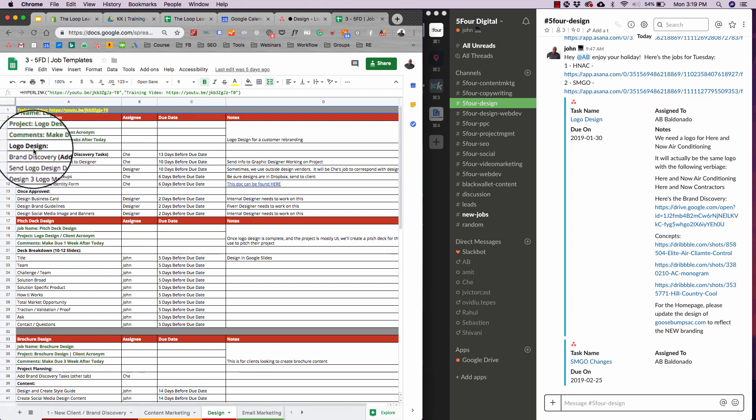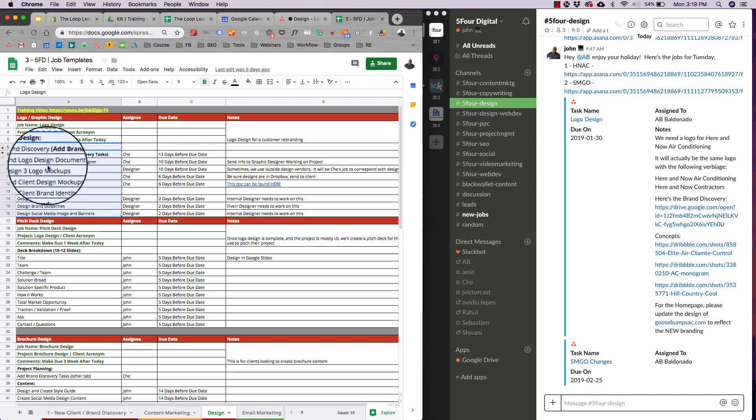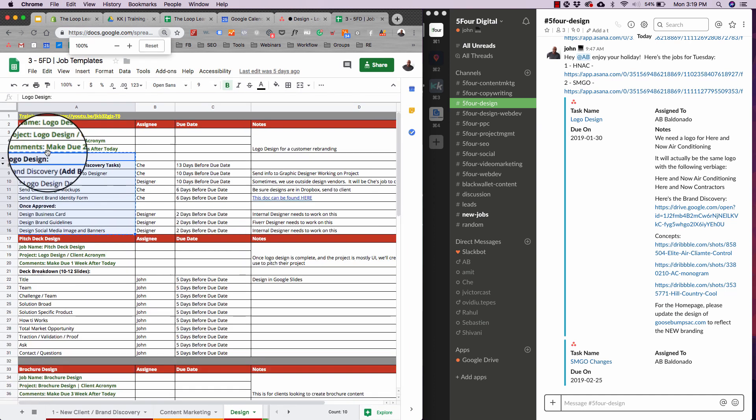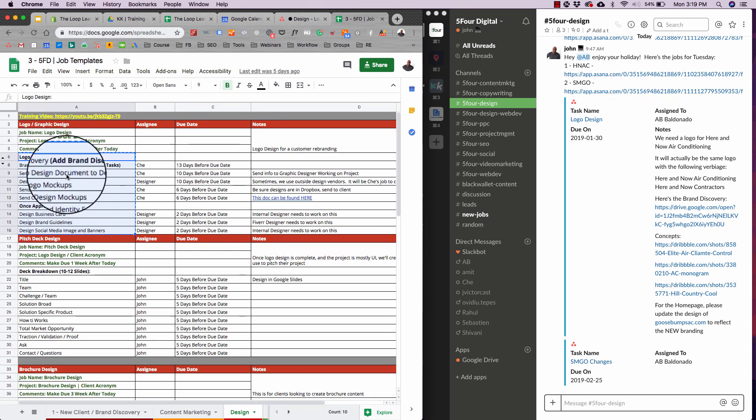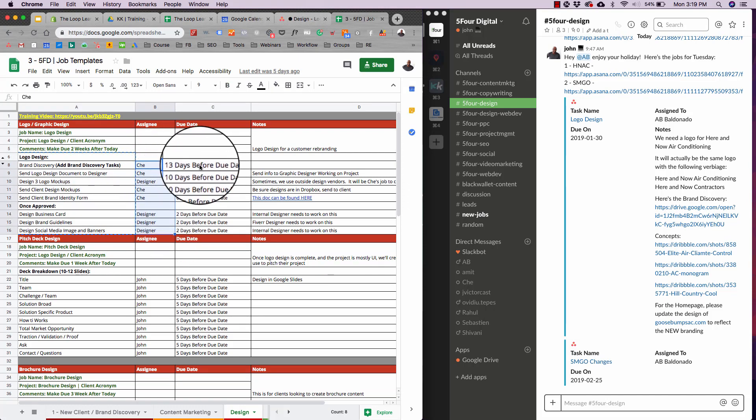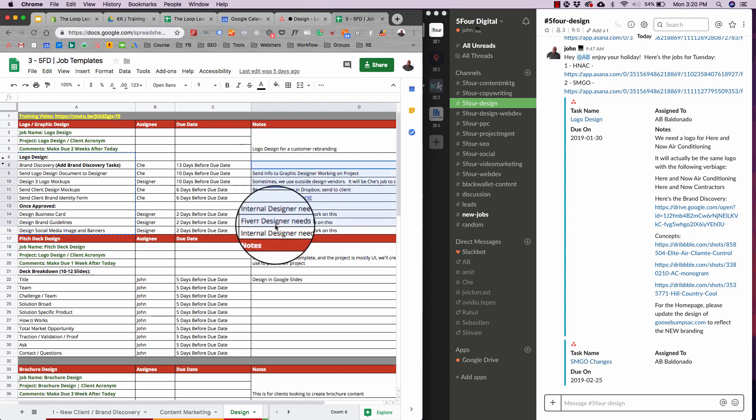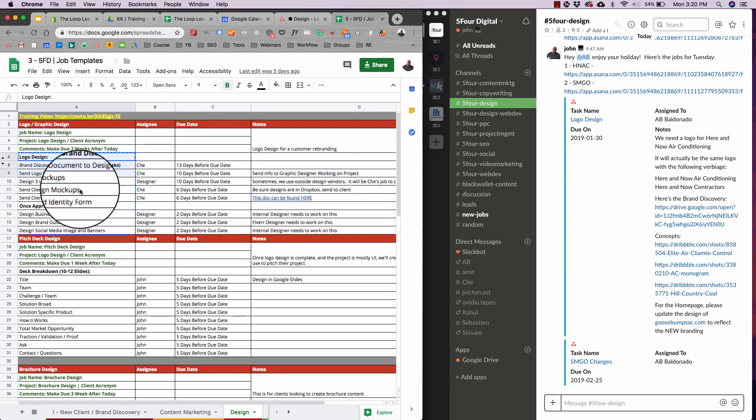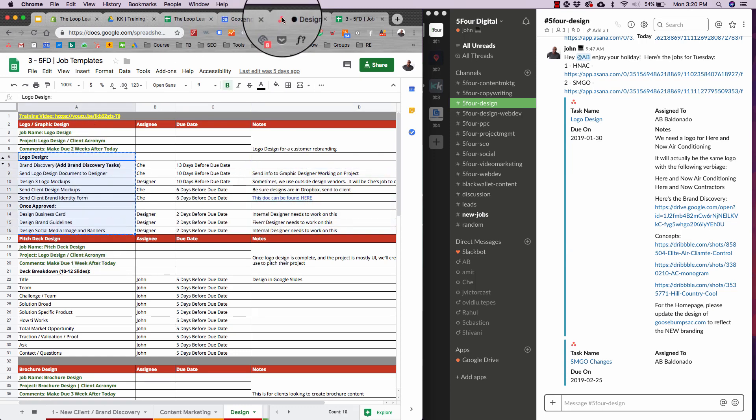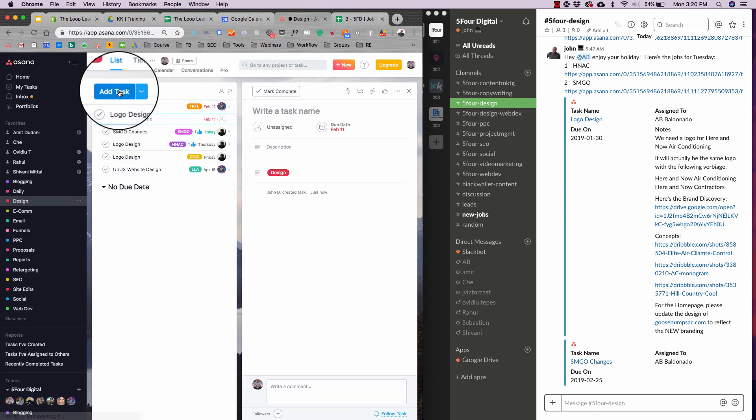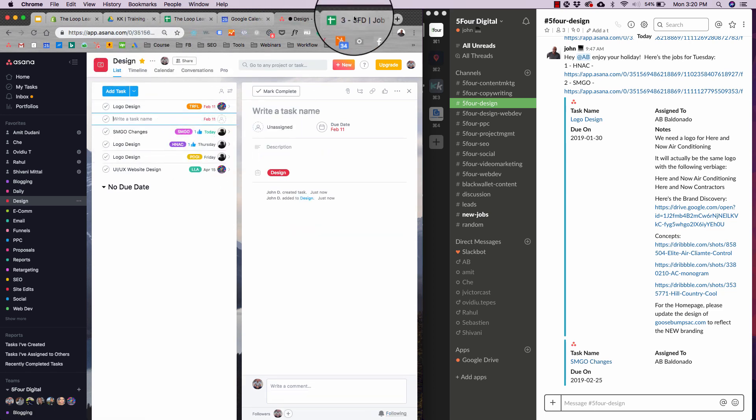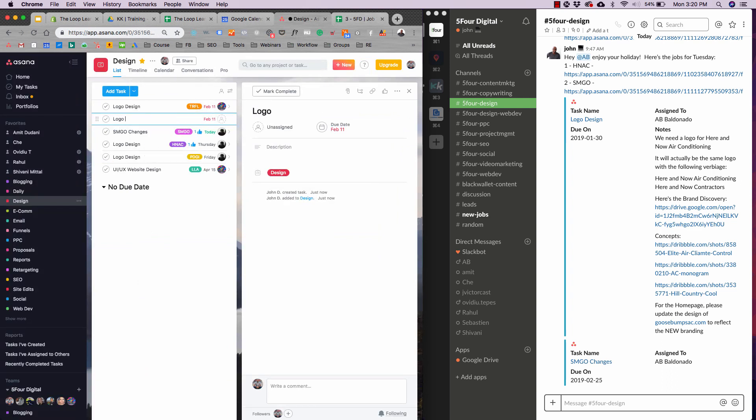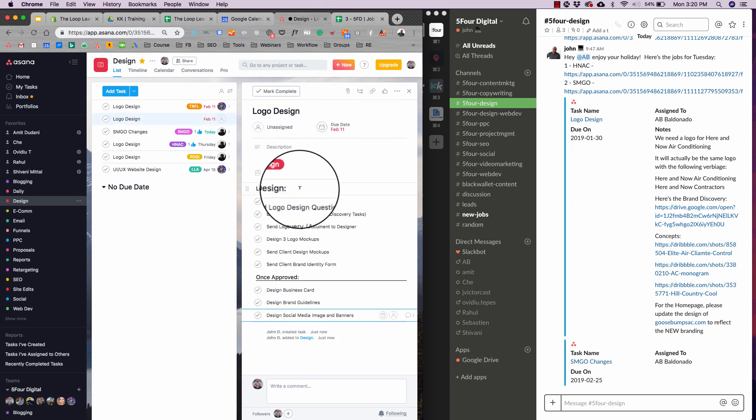So here's the logo design, a nice, simple, easy job. What I usually do, and let me zoom in, is have the first column be the name of the job. The second is the assignee or the person that's going to be working on it, the due date, and then any notes that are attributed to those sub jobs. So I'll just take this, copy it. I'll go into Asana. I'll hit add task. I'm going to title this logo design. Then I'm going to add a subtask and then I'm going to paste. And as you can see, everything is organized and ready to go. Super efficient.